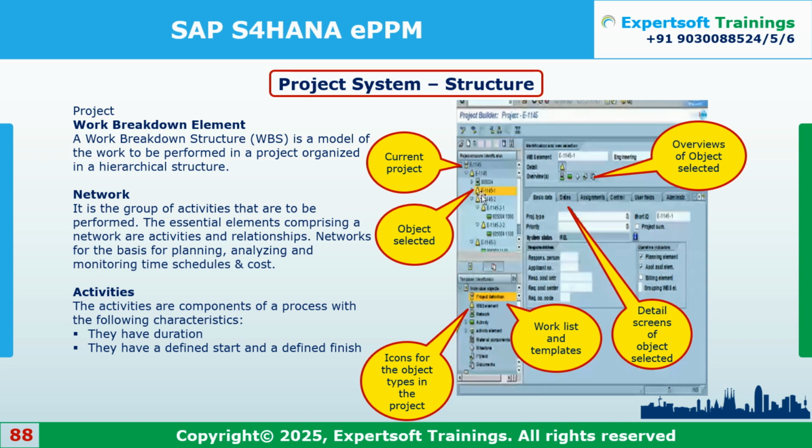Finance has to start their JV postings or any overhead postings. The procurement team will post some sort of a PR or a PO. Similarly, for the production-relevant activities, they will perform their production activities. But first, the project manager or project team has to set up these projects. Then only the subsequent departments will start their activities.